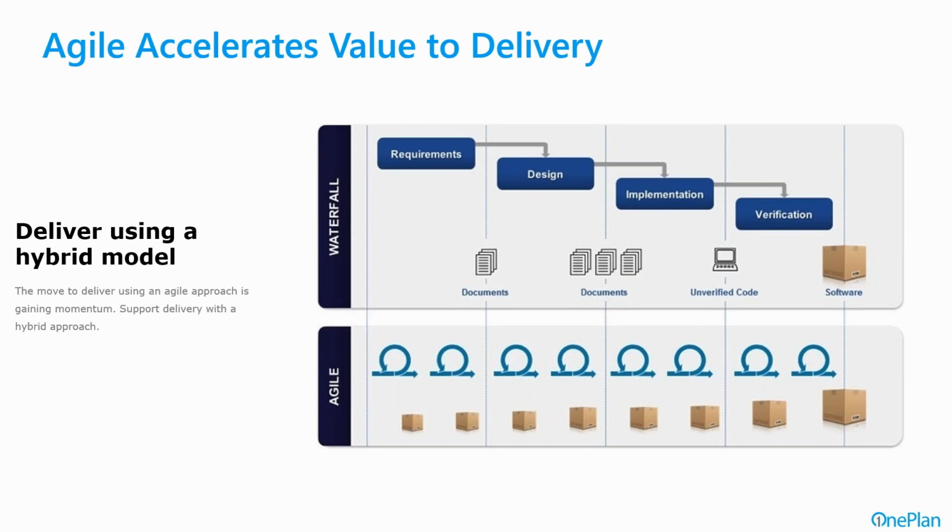You have an agile environment that can be run by the Scrum teams, and you have a waterfall plan that you can report to your senior executives saying, yes, this project will be done by this time. And again, in a services organization that sells a deliverable, a basic example is a bridge. There is a huge pool of stakeholders that expect this deliverable, the bridge, to be done at a certain time according to certain milestones. That doesn't mean that each individual team that is billing on a time and materials basis has to use a waterfall schedule in order to get this done.